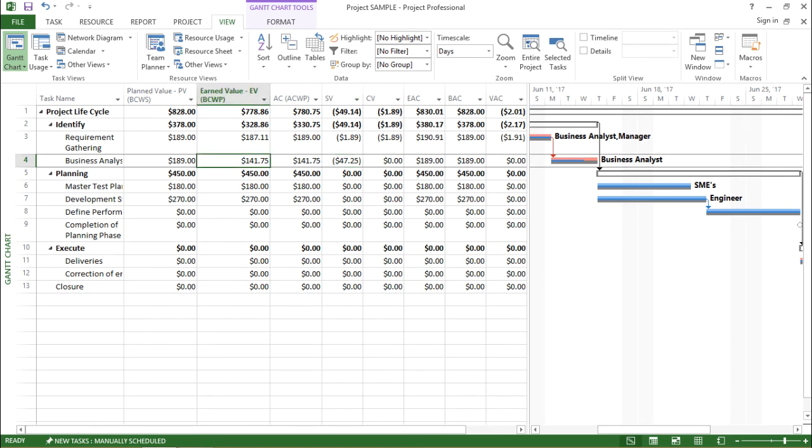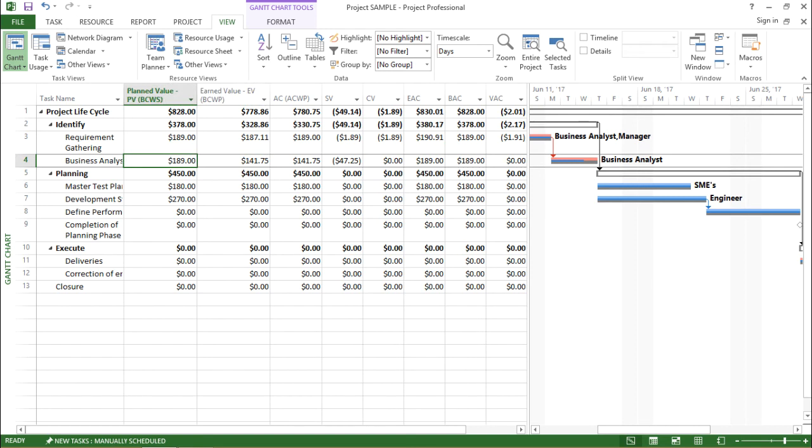If my task is 100% completed, it will be similar. But as we have changed it to 75%, that is the reason. Now I can see there is change in planned value. The value in planned value is different than the value in earned value. So this is what update task does.